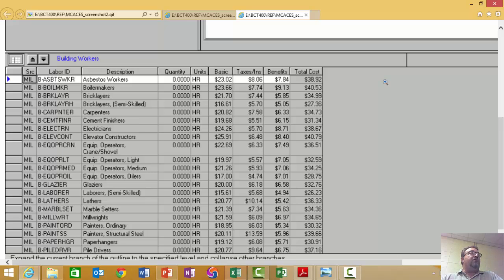How did you come up with your charge rates for your labor and your equipment? How did you figure your labor burden? How do you figure labor burden? Good thing I'm giving tests in here. It tells you right here. This basic right here, I think, would be a direct wage, and labor burden is nothing more than taxes, insurance, and fringe benefits based upon the labor wage.